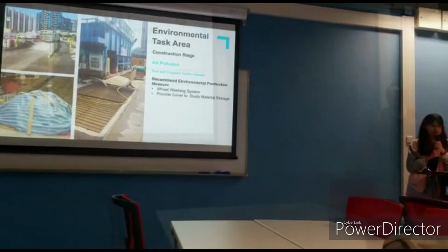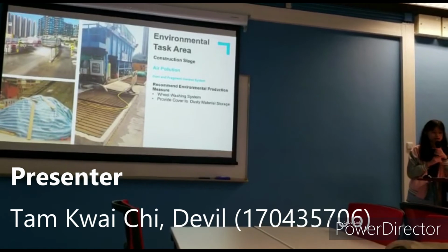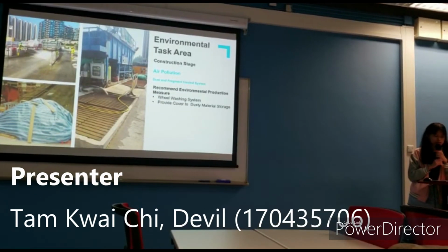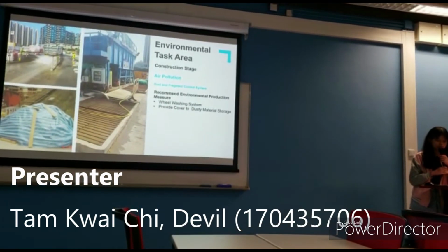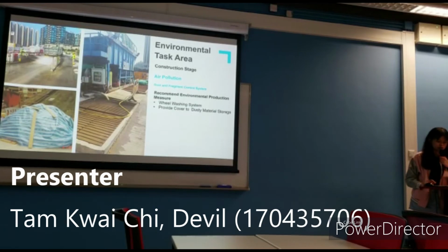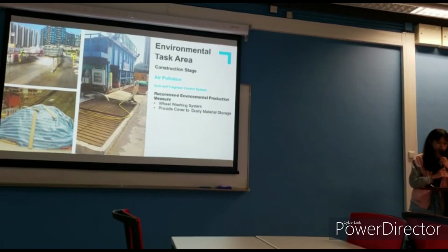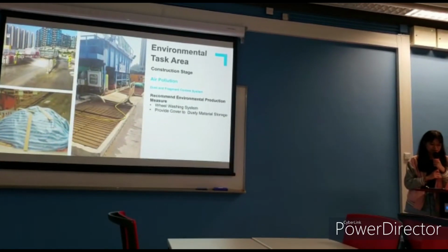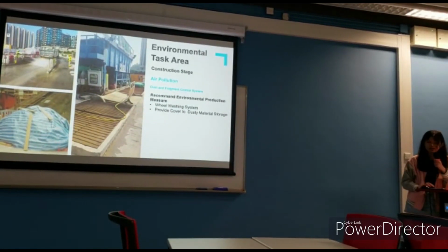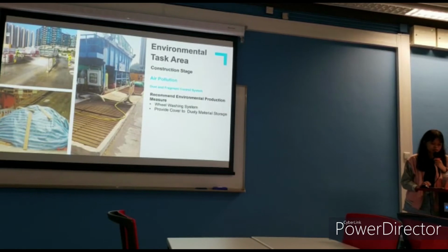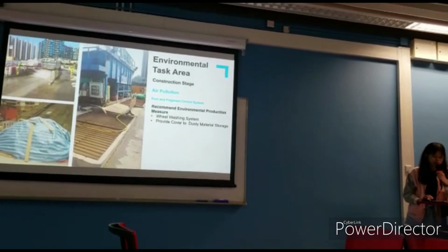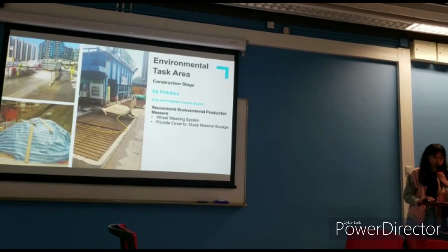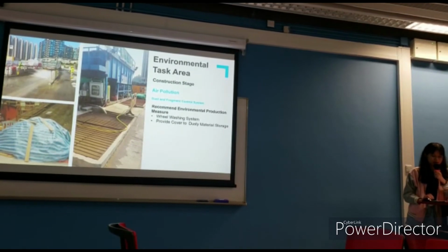Next, I will talk about the environmental aspect. During the construction days, it is very significant that air pollution and noise pollution will be caused to the public. According to the initial design of this development, the proposed ground level will be higher than the existing ground level. So the soil will be excavated from the ground and will need to be filled and compacted for the site formation work in the future.